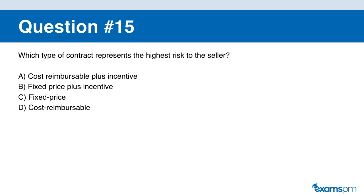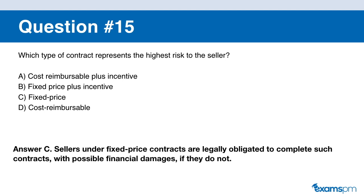Question number fifteen. Which type of contract represents the highest risk to the seller? A: cost reimbursable plus incentive. B: fixed price plus incentive. C: fixed price. D: cost reimbursable. If you said C, you are correct. Sellers under fixed price contracts are legally obligated to complete the contract with possible financial damages if they don't — meaning they must complete the work even if it makes them unprofitable.